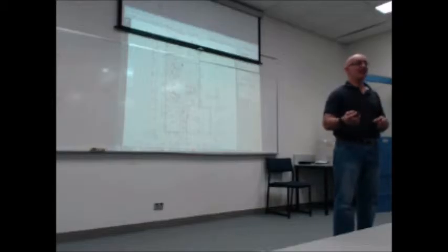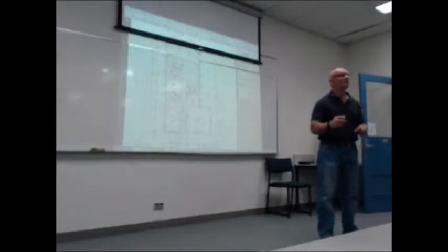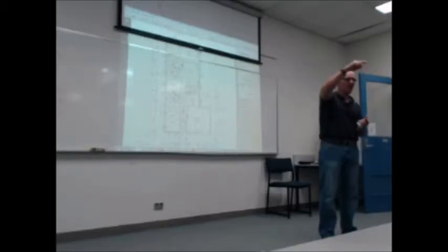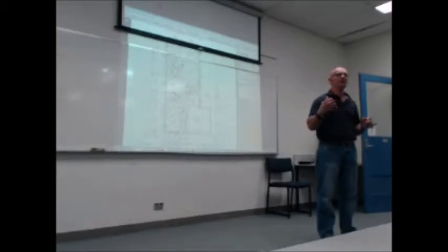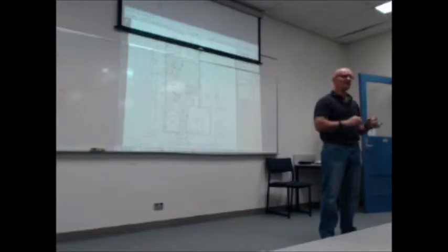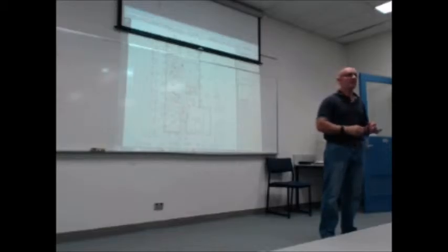You might not even get that tile. Yeah, run out there. I did an ensuite not so long back, and you know the glass drip multi-length, like a mosaic with the long and the all over the place. 24.4. She didn't order enough because we changed how much we're putting on. It took an extra 2, 3, 4 weeks to get a couple of extra sheets. So I had to leave out the right amount to put them in later on. So it was a pain in the neck for me to go back and put them in, especially when they didn't fit.